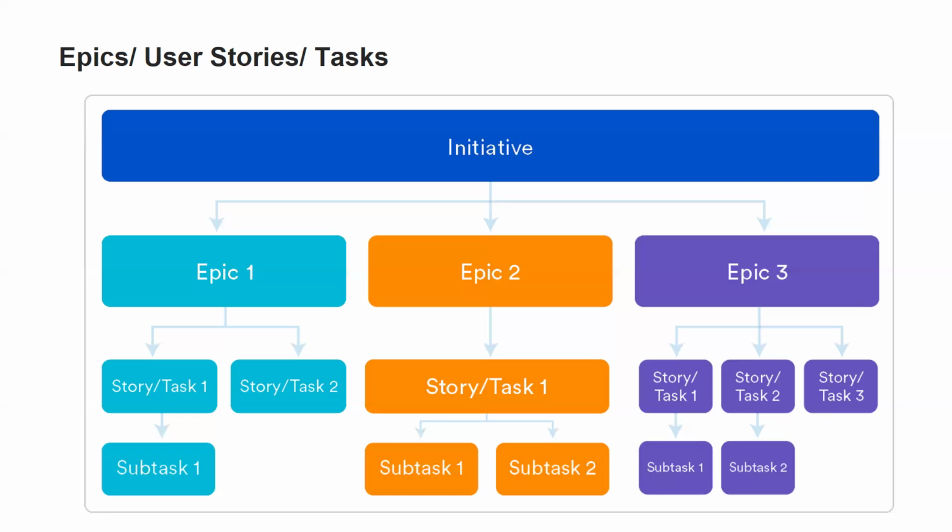And there can be another story as login functionality within the home page. Like that, there can be multiple stories. Under each story, there can be QA subtasks, development subtasks, BA subtasks. Like that, we can have different kinds of subtasks. So that's how the requirement will be defined during a Scrum process.